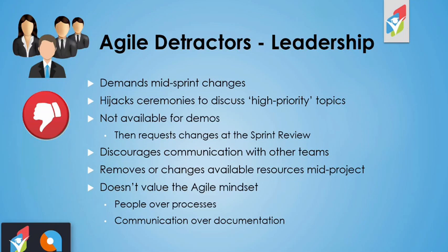Another big detractor with leadership is removing or changing available resources mid-project. I know sometimes this can't be helped, and organization and businesses change all the time, and it has to be done sometimes. But I've been part of some projects where the development team was not the same week in and week out. And it's hard enough to move forward on a solution with sprints and making sure that everything's aligned when you have a team that's steady. But now go ahead and start removing and adding in different resources and changing resources all the time. It just doesn't work. That team needs to be stable.